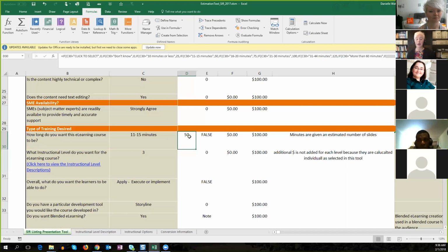And then I usually give fixed bids. I don't usually break it out by hours. I know Dennis tends to break his out by hours. I tend to go this route, but I think it's different because I have employees. The way I bill is we do a project kickoff. We typically bill at storyboard, alpha, and gold, or maybe project kickoff, alpha, beta, gold.